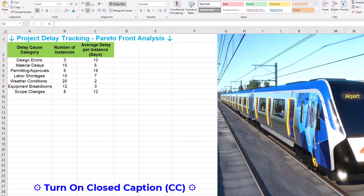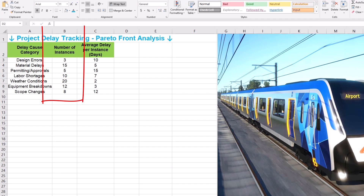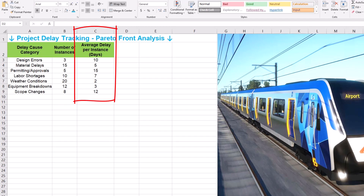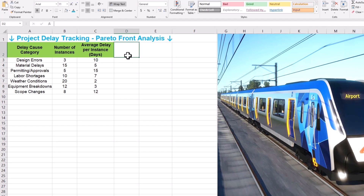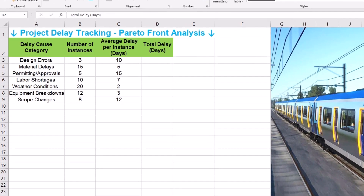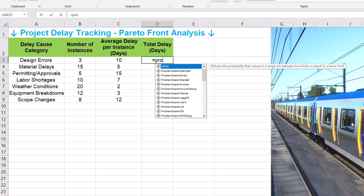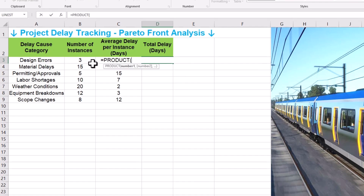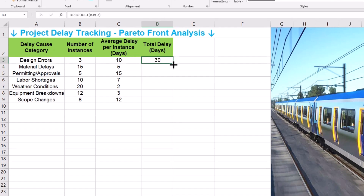Be as comprehensive as possible based on your project experience and data. Next, in column B, we are counting number of instances — how many times each type of delay happened. Column C is the average duration of each delay instance. And column D is total delay in days, simply calculated by multiplying number of instances by the average delay per instance. Use the product formula in cell D3 and drag it down for all categories. This gives us the total delay contributed by each cause category.